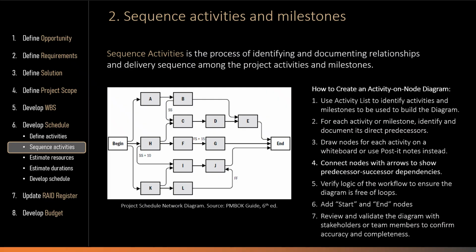Some dependencies are mandatory. These are required by the nature of the work, technical constraints, contractual obligations, or regulations. They are sometimes called hard logic. Other dependencies are discretionary. These are based on preferred ways of working, best practices, resource considerations, or team judgment. They are sometimes called soft logic.